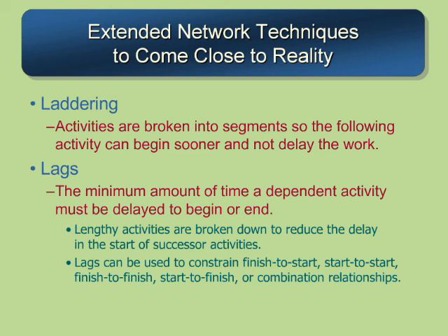If you think about it, and I might have mentioned it in an earlier slide, activities and work sometimes involve waiting around, and lags allow you to program in those waits without them taking up valuable duration time within the activity itself. They're sort of cruel to do by hand when we do project networks, but they're really easy to do within Microsoft Project, and you'll get to do that as part of the case, I believe.